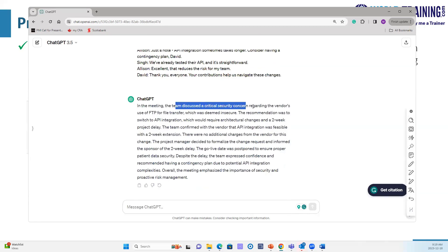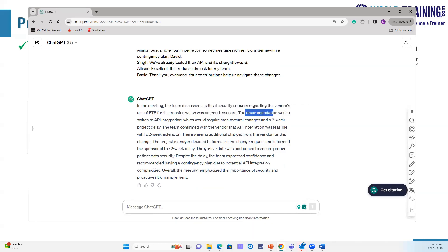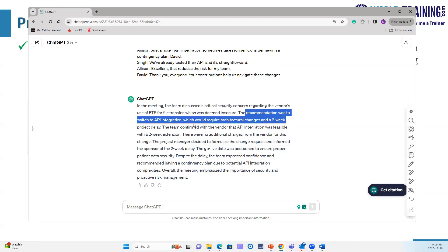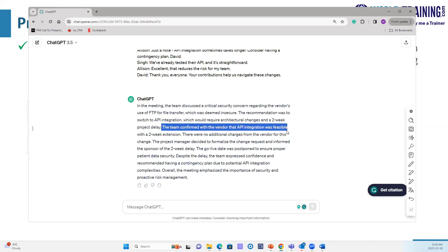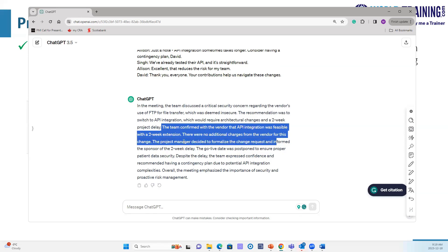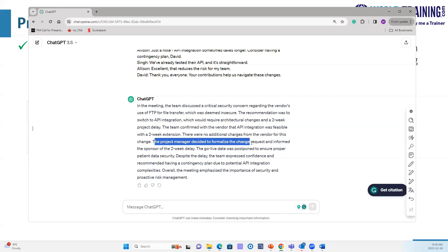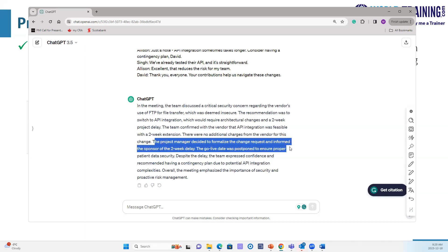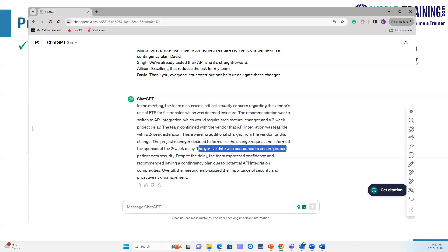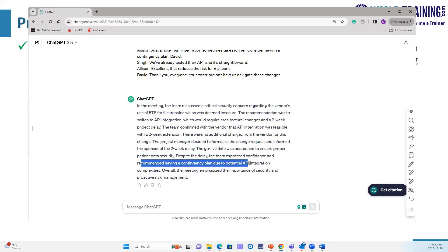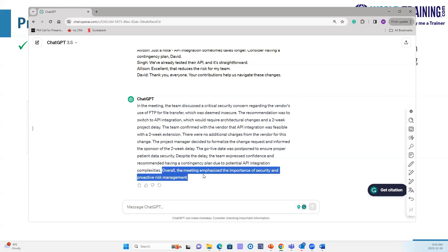ChatGPT's response: In the meeting, the team discussed a critical security concern regarding the vendor's use of FTP for file transfer, which was deemed insecure. The recommendation was to switch to API integration, requiring architectural changes and a two-week project delay. The team confirmed API integration was feasible with no additional charges from the vendor. The project manager decided to formalize the change request and inform the sponsor of the delay. The go-live date will be postponed to ensure proper patient data security. The team expressed confidence and recommended a contingency plan due to potential API integration complexity. Overall, the meeting emphasized the importance of security and proactive risk management.